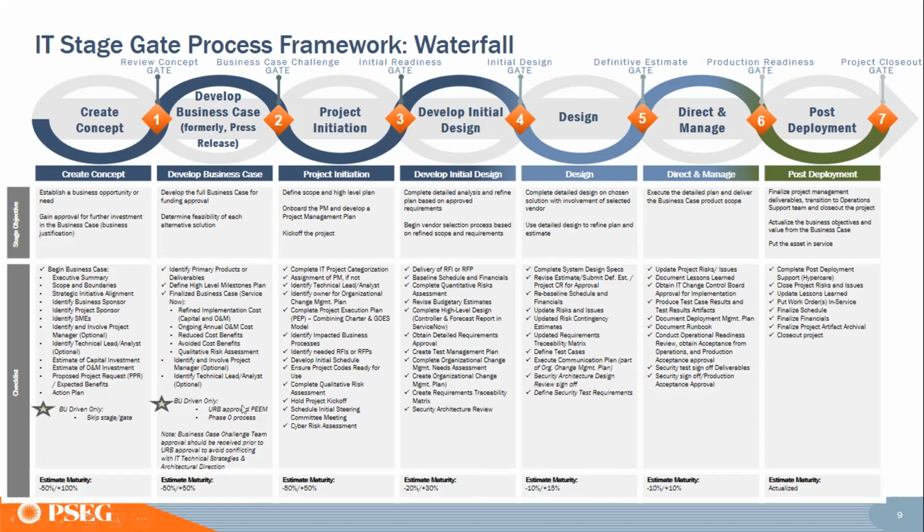So you will be taking baselines at each of these stages and referring back to your customer, because the customer has signed off on a 50% cost estimation, right? Plus minus 50%. But as you refine it, and if you find that your more accurate cost estimates are in, then you should share with them and say, hey, I'm going to now have this project at this particular cost estimate. Are you still interested to continue, or do you have other thoughts?